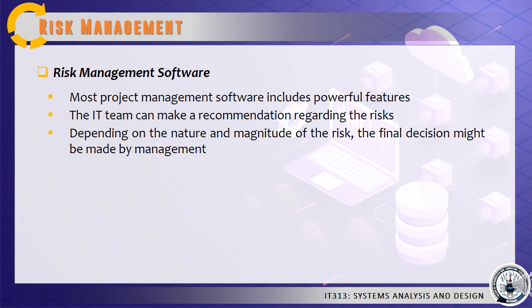The description, which specifies the nature of the risk. The mitigation plan, which identifies plans to control or limit the risk. The contingency plan, which specifies actions to be taken if the risk occurs. And trigger, which identifies a condition that would initiate the contingency plan.